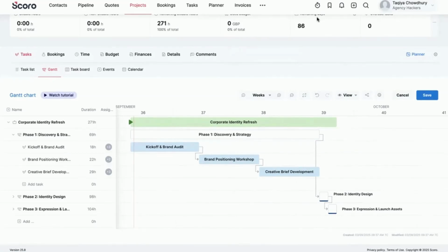To summarize, what we discussed right now is the quote view, which is essentially going to serve as your project budget. Once you turn that into a project and start bringing it into the project view, what you will do is see a budget aligned to that project. The option to bring the line items from the quote over as tasks always will exist as well. And that then basically ties each of these tasks to the line item budgets in the quote as well.